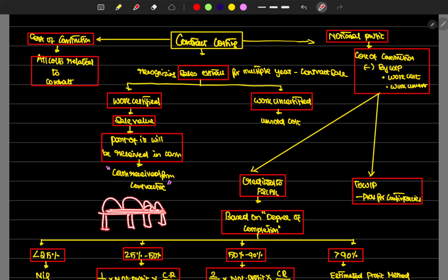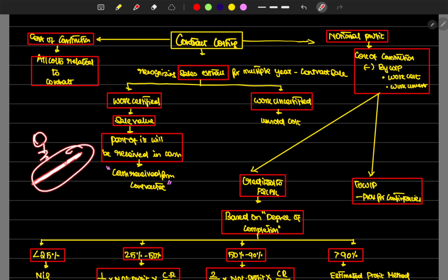He put the one side track, but he didn't put the other side track. The other side track also has to be put by L&T. But what the surveyor is telling is, you have only put one side track. So we can only give work certified for the fully completed works. We can't recognize this one side track you put.